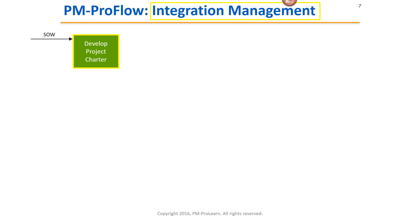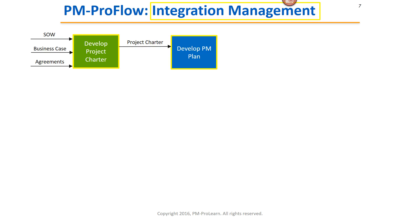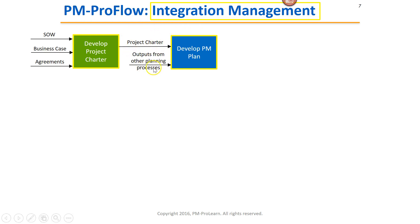To develop the project charter, we need a statement of work, a business case, and any existing agreements. The output of Develop Project Charter is a project charter — that's the main document — and that's an input to the next process called Develop PM Plan. Notice it is also highlighted, as it's part of the integration management knowledge area. We also need outputs from other planning processes as input to Develop PM Plan — we'll get into that in class. The output of Develop PM Plan is the project management plan.